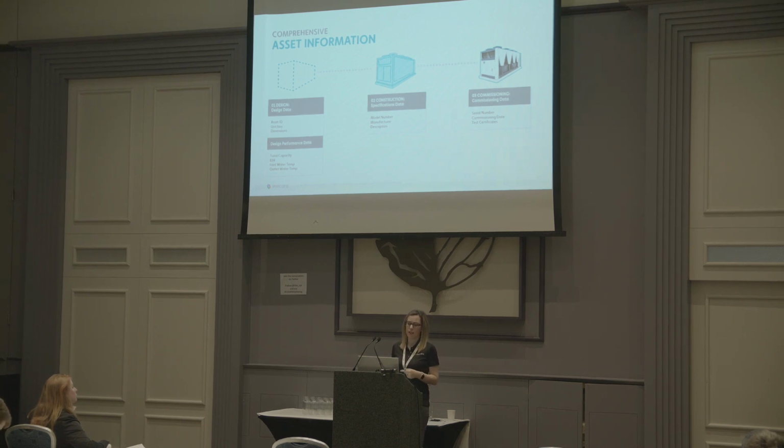And then again, the commissioning data. So generally what we would do on this is we would work with the contractors to get their typical commissioning data forms, digitise them, and get them to use our digitalised version. And that data is then sucked into the platform, but can also be used by the contractor as they would typically do so. It just allows it to be tracked going forward.